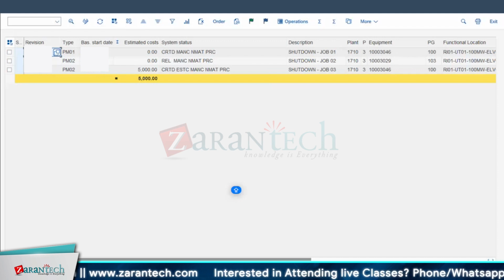Examples, all those orders I want to track. Then that time this revision code you create and you assign to that. Whatever your preventive maintenance things you are doing regularly, it doesn't come under your shutdown anyway, however you are doing it. That is fine. You don't assign any revision code for that. So I'm assigning. This is like Maximo's parent work order.